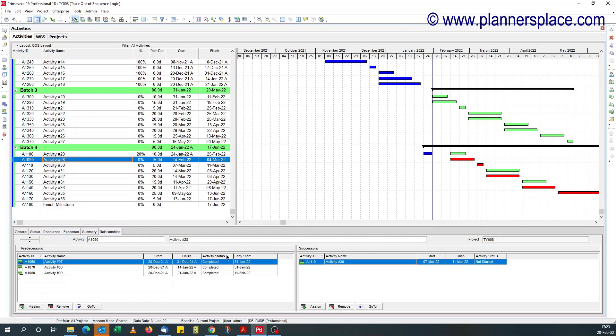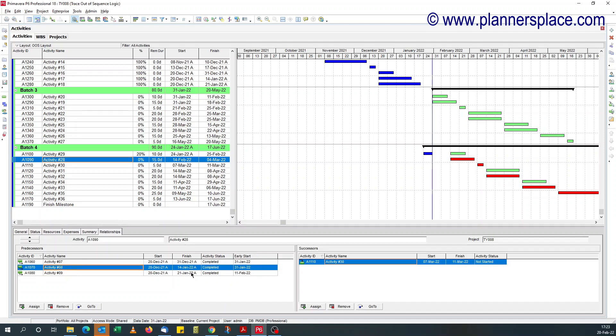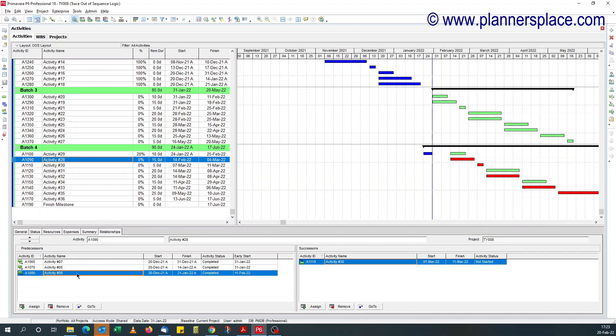And from the early start date, you can see early start date for completed activities should be the data date. So you can see for activity number seven is the data date of 31st of January. Activity number eight is the data date of 31st of January. But activity number nine has a date of 11th of February, which shows that something else is driving this activity.